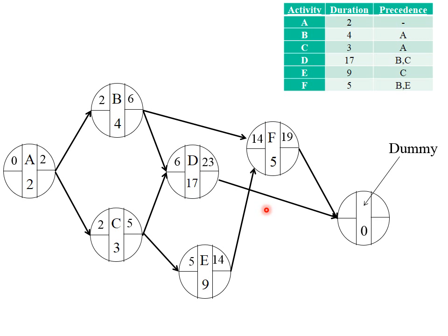We added a dummy activity which takes no time, no resource time. It takes time 0. When is the earliest you can begin activity dummy? Well, you have a choice between 23 and 19. Obviously you will select 23. And when will you finish this latest by? 23 plus 0, 23. And if not told otherwise, you will assume that the latest you're allowed to complete this dummy activity is 23, and start this by 23.